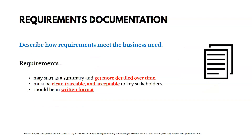As we gather and collect requirements, we generate requirements documentation describing how requirements meet the business need. Requirements may start as a summary and get more detailed over time, but they must be clear, traceable, and acceptable to key stakeholders. Everybody really needs to understand what they are, and they should be in a written format.